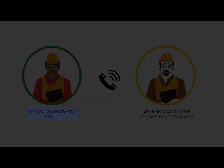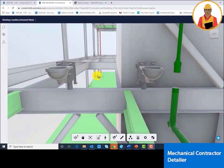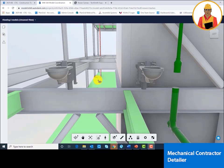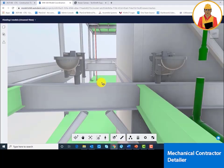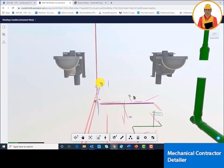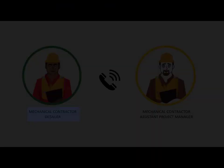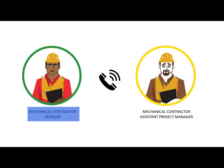We definitely need to RFI this one. The sanitary lines from these toilets can't be run because there's a structural beam below. But it's not that big of a deal because if we switch the water closets from being wall hung to floor mounted, then we'll be able to run the sanitary underneath and miss the beam.